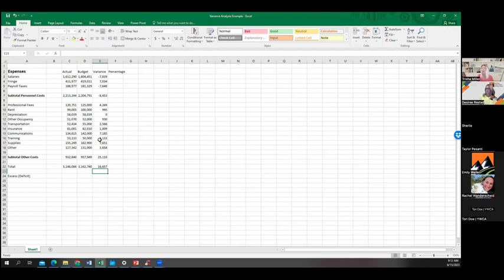So here we spent more. Like if we look at the training just right away, right? We said we'd only spend 50,000. We spent 53. Well, okay, so let's think about COVID. What if we had to train everybody how to contact trace? That is going to come out of nowhere that we didn't expect to happen, right? So that could potentially be the reason we did so. But we want to look to see, okay, how come we're spending less money in some places and more money than we should? So just looking at this total budget, that's not enough, okay? We want to look at the differences and the percentages to do all this.